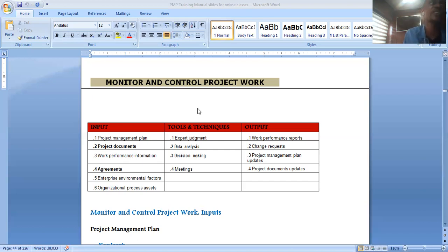And then you will now make your decision. Your decision may be that we are not reworking it. Your decision may be that we are reworking it, not even only that part. As you are working, I'm changing the civil engineer. You're making that decision. And besides, for you to rework it, or you're coming up with an alternative, there will be a change request, right? If there's a change request, there must be an approval of the change request. And I told you about defect repair. You must come up with a plan for how to repair that which is bad.